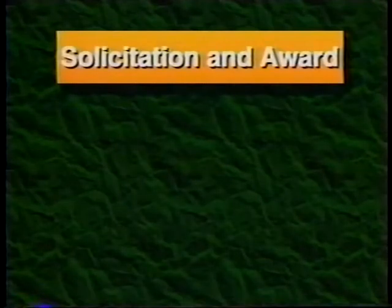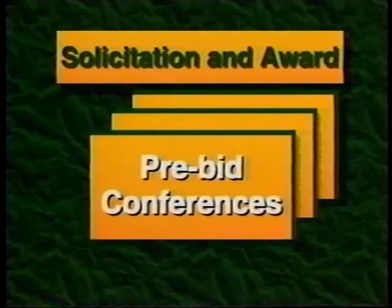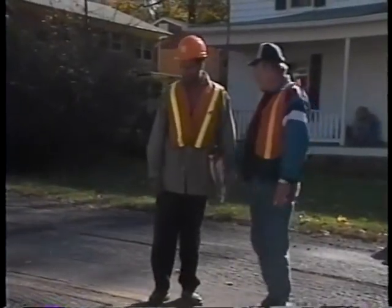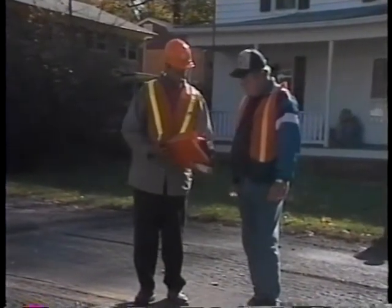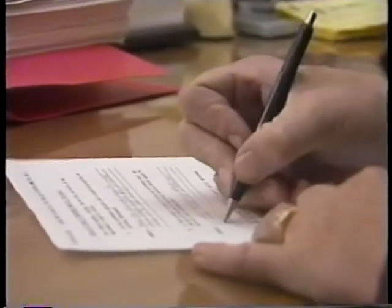There are five components to the solicitation and award stage: contractor interest, contractor pre-qualification, pre-bid conferences, bid analysis, and contract award. Agency personnel should use time at informal meetings, contractor association meetings, or even job sites to determine if there is contractor interest. Another method is by written survey. Most contractors respond indicating an interest in contract maintenance. In some parts of the world, contractors may not have highway maintenance experience, so the agency should hold maintenance workshops.